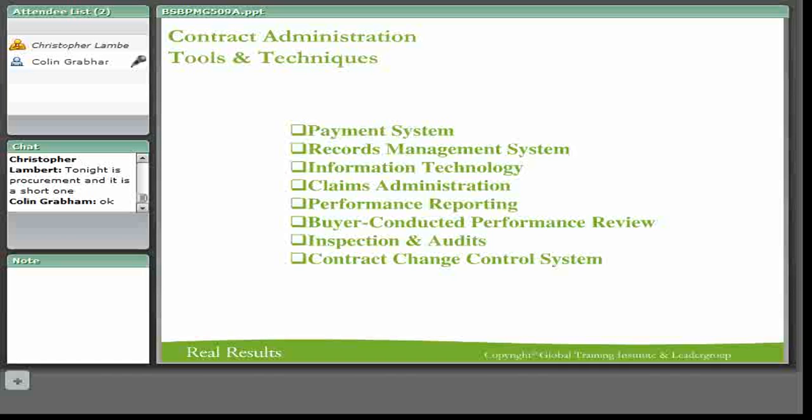So what you've got to do is say, well, if you hit this hard rock, then we need to negotiate what we're going to do. And often what we did is actually bring in a second contractor for that second part. So we'd say to them, if your price is over this one, then we have the right to bring in somebody else to give us a quote to do that portion of it. So that's about contract negotiation and mitigating your risk, which is actually bringing a second contractor for that.